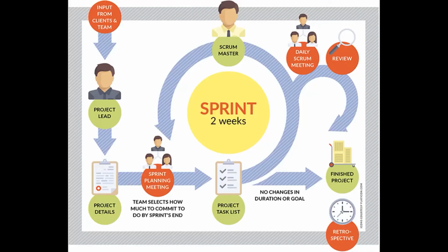Scrum, or Agile project management, is a philosophy which moves to the working stages more quickly, breaking the project into smaller tasks and provides a more iterative approach. Scrum works in smaller chunks known as sprints, where the project team works to complete smaller tasks and is able to shift priorities at the end of each sprint, making the process more agile.